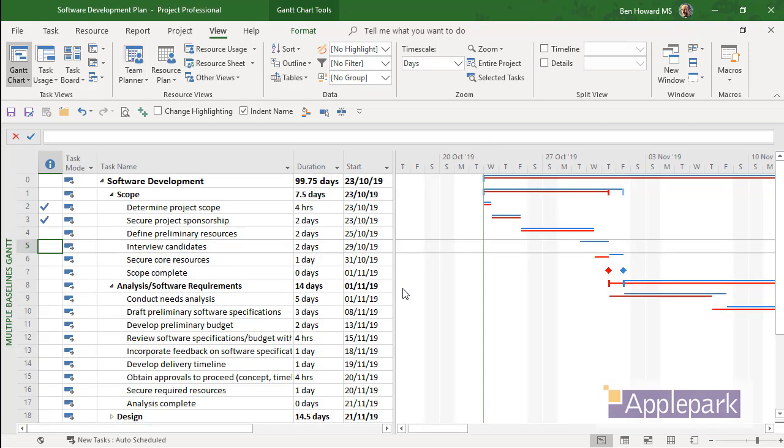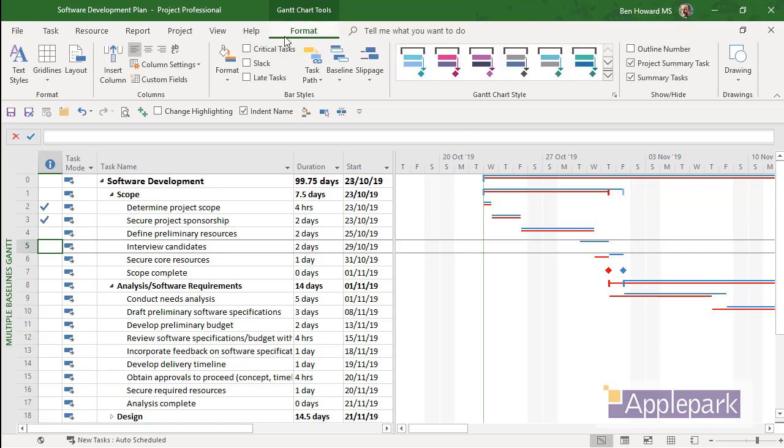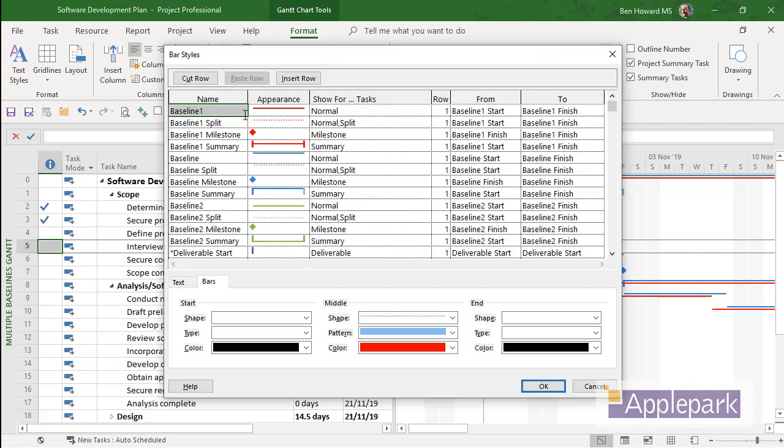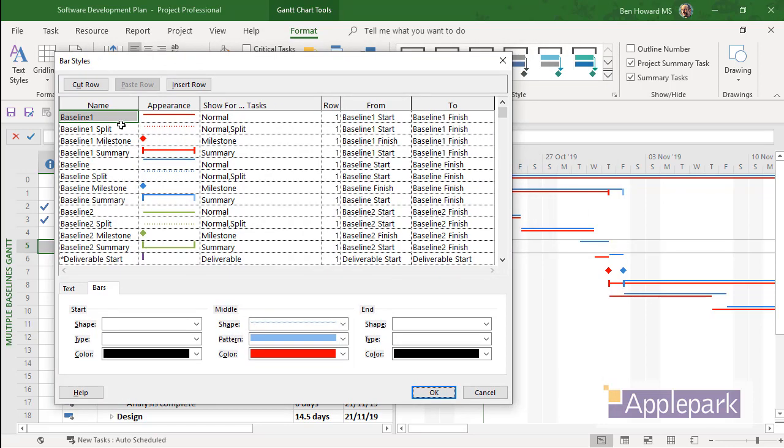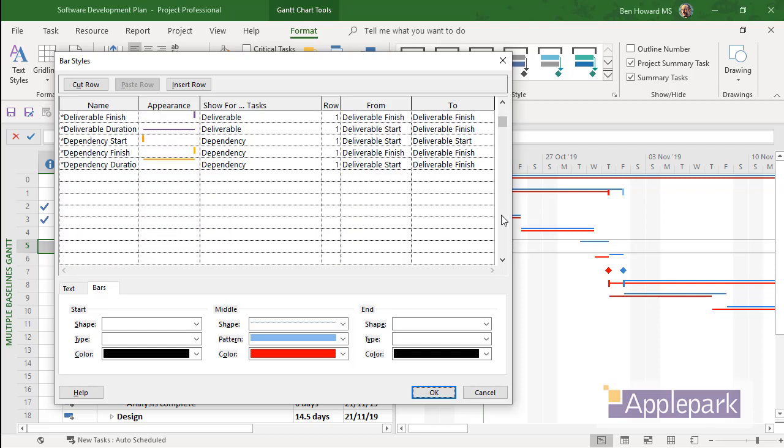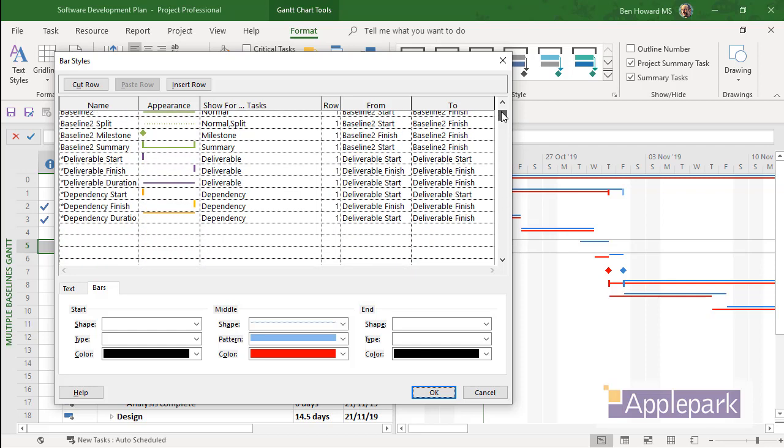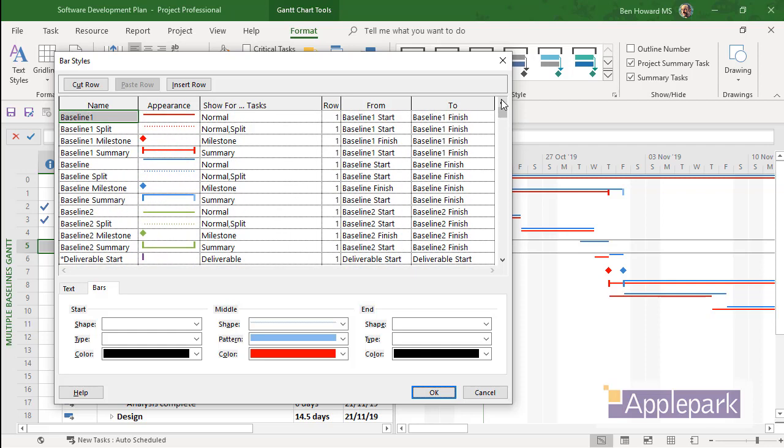So what does this show me? Well, ultimately if I mouse over a particular field, then it should pop up as a toaster and tell me what we're looking at. If that's not working for you, you can always click on the Format, Format Bar Styles dialog box, and you can see here what we have. We have Baseline 1 in red. We've got the original Baseline in blue. So the original one is in blue, Baseline 1 is in red. And then if we had Baseline 2, then that would be displayed as well.